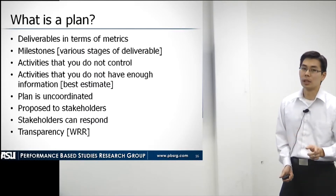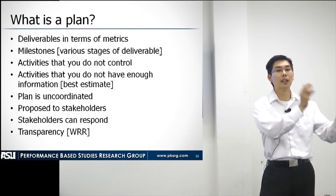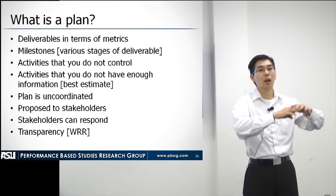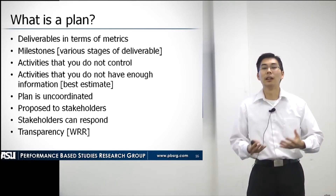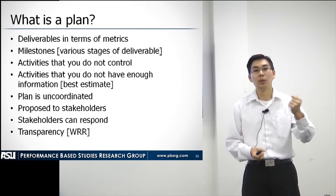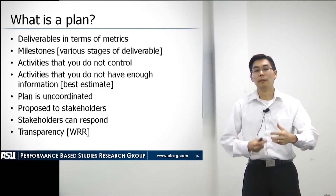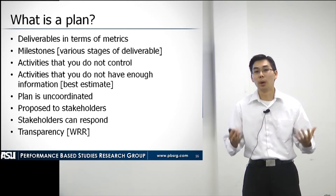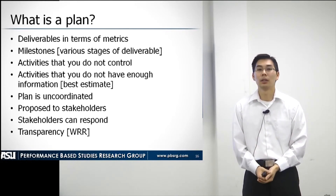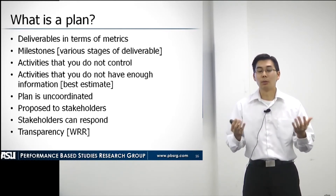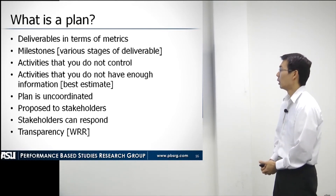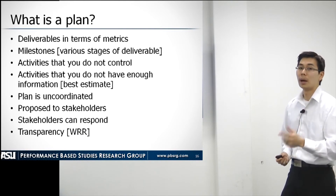Originally the plan is uncoordinated. This means we will want first the vendor to tell us what their plan is, and after the vendor has told us what their vision is, then the client can give their input. The client can say they don't approve of something or it cannot be done. At that time the vendor will have to identify a way to work around it. If the vendor has to change their plan to account for the client, that will cause adjustment in anything required in terms of time and cost, and it will have to be approved by the client or the buyer.